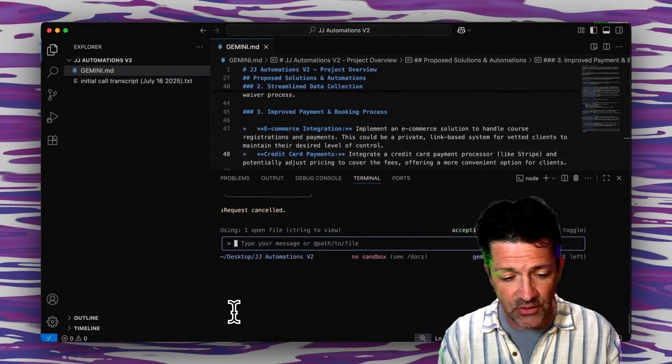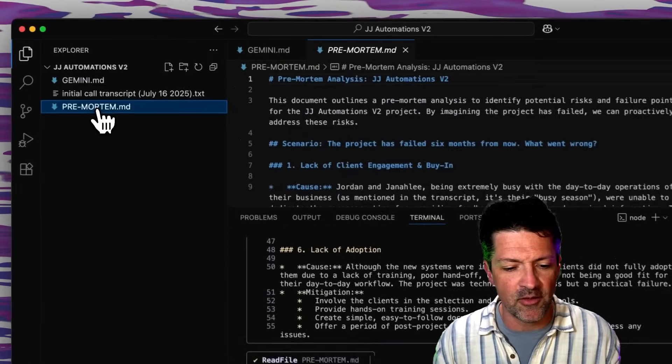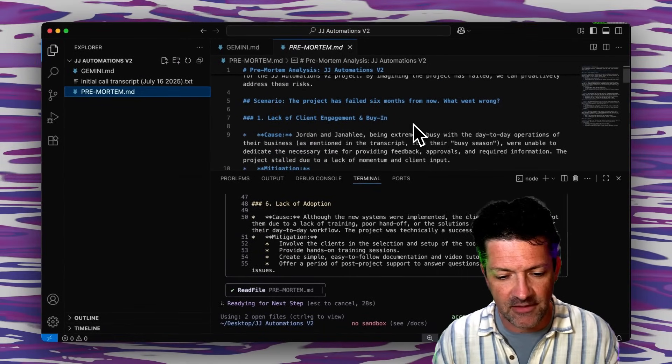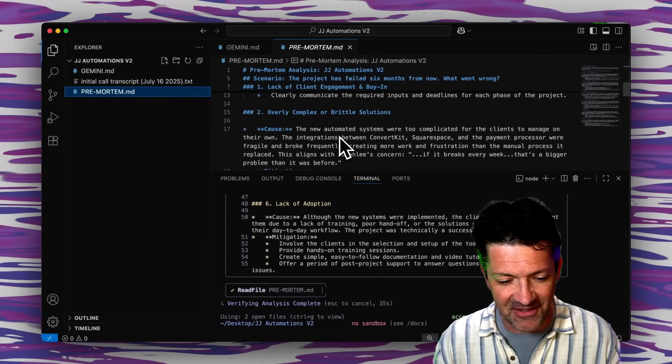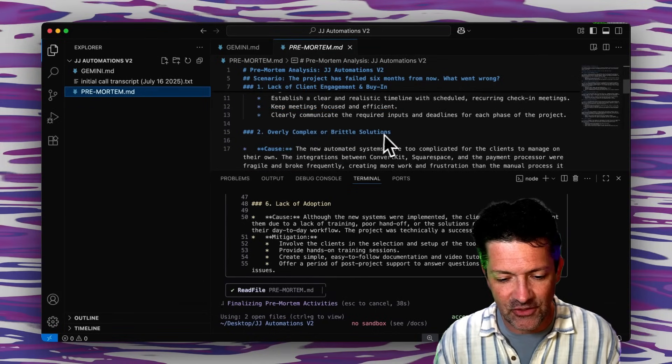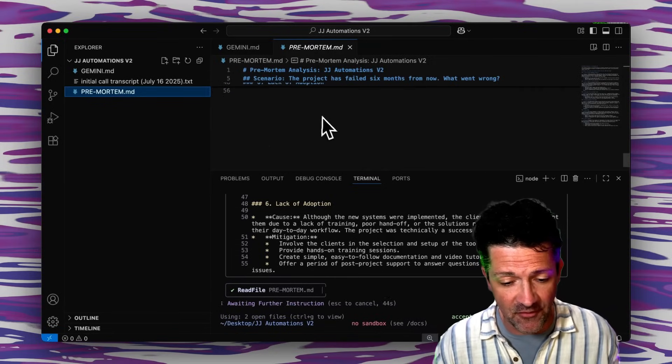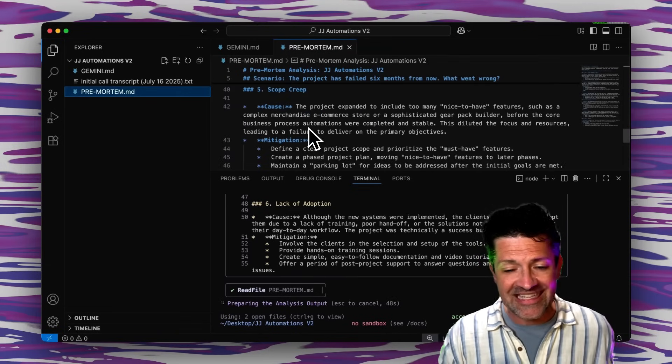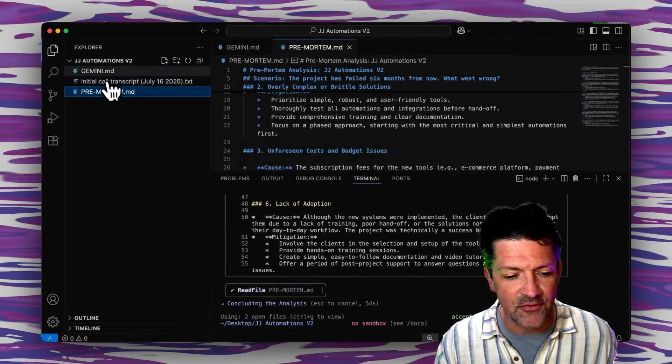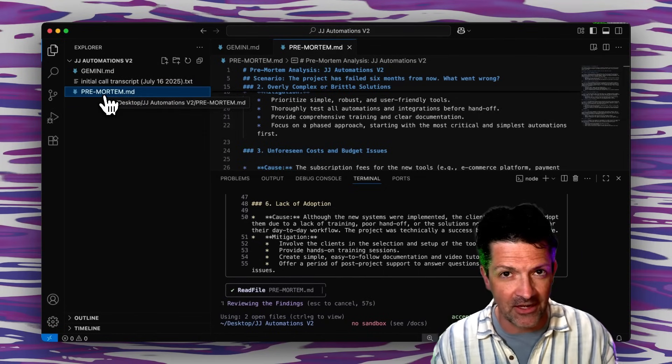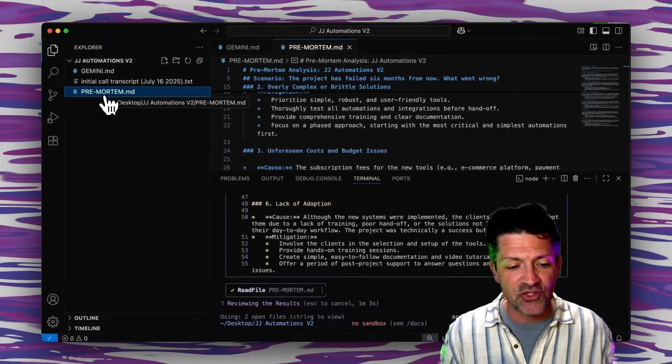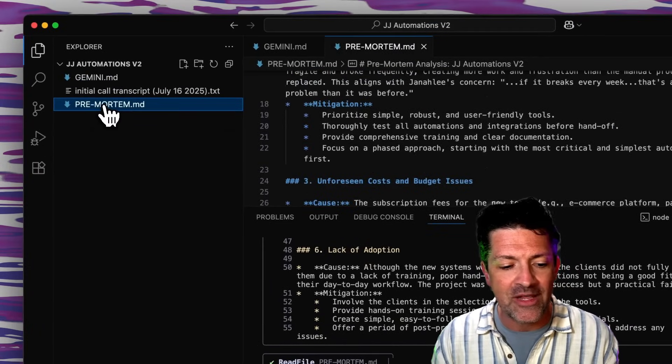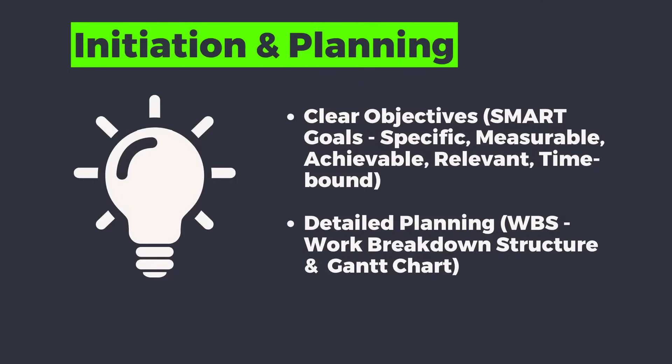Copying this right into Gemini inside of VS Code and there we go it's created this pre-mortem document that talks about all of the different things that could cause this to go sideways. Lack of client engagement, always a key one. Overly complex solutions, these are great, these are exactly the things that I want to watch out for. Now we have a file that has those all there so you can see already how this is much more powerful than just having this in the chat string somewhere. We're creating these different pieces that we're going to be using later, sharing with the client. Client engagement, stakeholder engagement is key. It's just so nice to have these right here we can refer back to them, we can edit them.